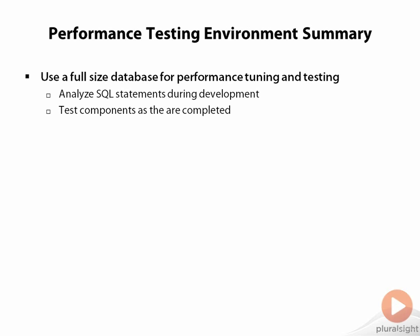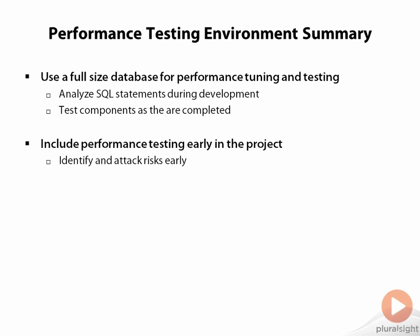We also want to make sure to be incorporating performance testing early in our project lifecycle — this is all about risk management. We want to identify areas of the application that could be at risk for performance issues and get a measure of where we stand early so we can address those risks early in our project. Don't leave performance tuning and testing until the very end of your project. Try to analyze and test both statements and application components as you work on them. When our project moves into a formal test phase, ideally we would like to conduct a formal performance test and simulate the load our application will be under in order to identify any bottlenecks.